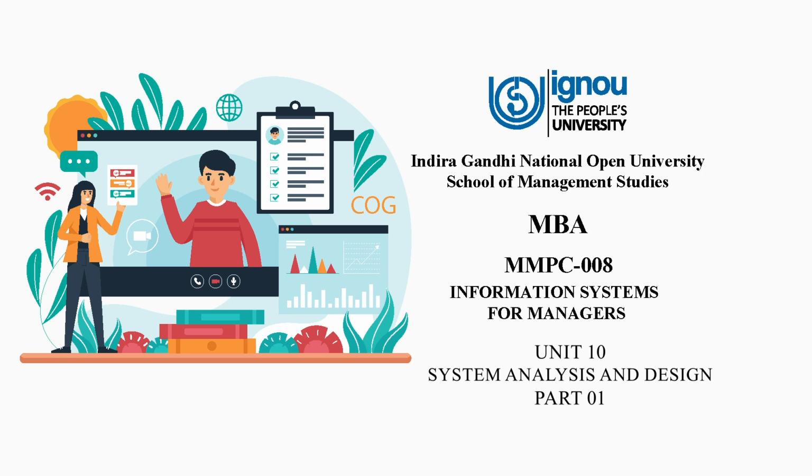The project leader and the initial team of system analysts also produce a specific plan for the proposed project, which the team will follow using the remaining SDLC steps. Now, this baseline project plan customizes the standardized SDLC and specifies the time and resources needed for its execution. The formal definition of a project is based on the likelihood that the organization's information system is able to develop a system that will solve the problem or use the opportunity, and determine whether the costs of developing the system outweigh the benefits it could provide, based on cost-benefit analysis.